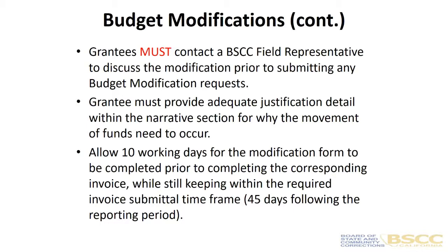And what you want to do is make sure that when you complete the form, you provide adequate justification for your budget modification. And also, please allow approximately 10 working days to complete this process. So once properly submitted to the BSCC, please give us approximately 10 working days to return it to you.